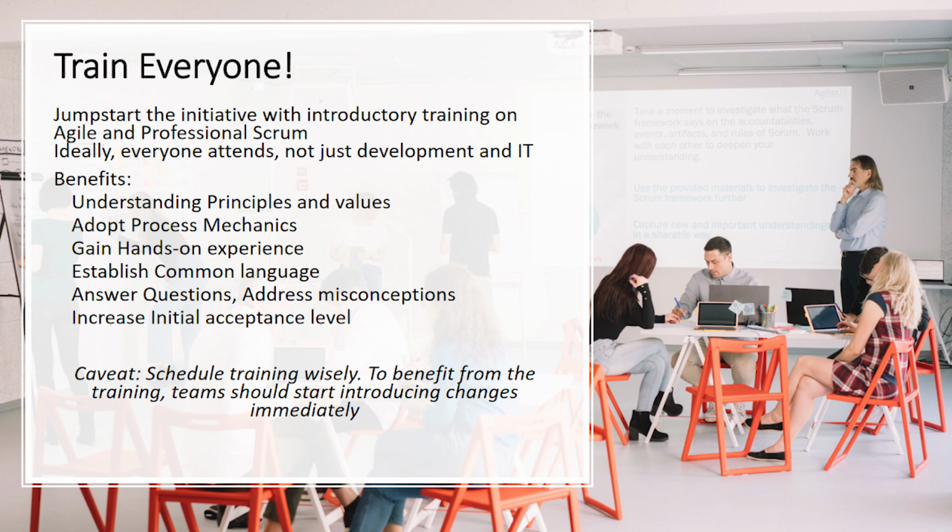And also, if they haven't already worked in a Scrum team, during such a training, they would get some first-hand experience of being a part of such a team. So, they would also learn the language, speak the same language afterwards, and understand what a sprint is, and what a product backlog is, and so on. But beware, schedule such trainings in such a way that as soon as the trainings are done and people gain some new knowledge, they get an opportunity to exercise that knowledge instead of starting forgetting it.